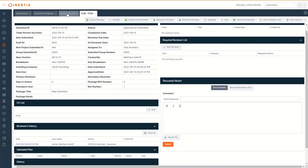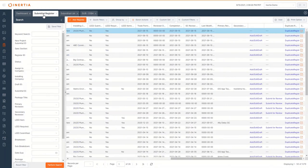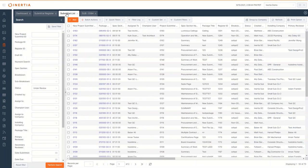In summary, the submittal workflow follows as such. The general contractor or subcontractor create a submittal register item where it stays as a draft until they have attached the appropriate documentation and submitted it for review. The appropriate reviewer is automatically notified through email that the submittal is ready for their review. Once the submittal has been reviewed and the status of the package is updated, an automatic email notification is sent.